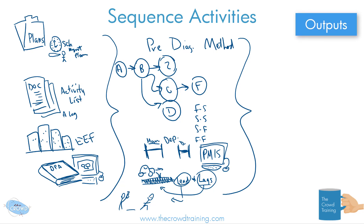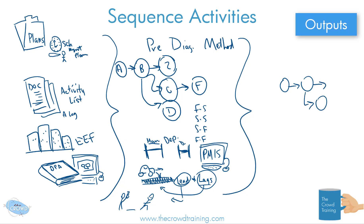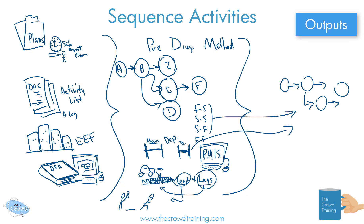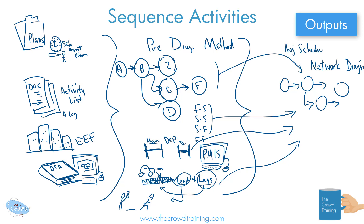Now let's move to the outputs. Since the whole point is to sequence activities, the output should be a sequence of activities — however they need to be performed — capturing relationships like finish-to-start or start-to-finish, whether they're mandatory, and any leads and lags. This is presented as a network diagram. How it's actually presented is up to you and your project team; different software systems will show this in different ways. Later, in the develop schedule process, you'll add timing and keep refining this network.